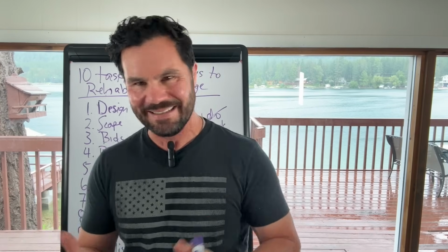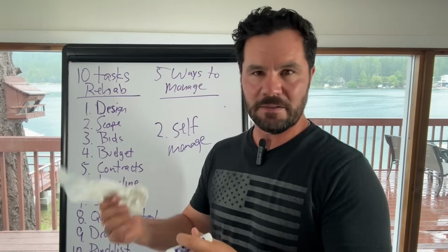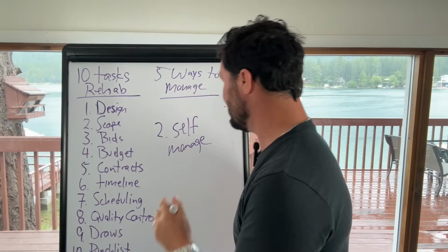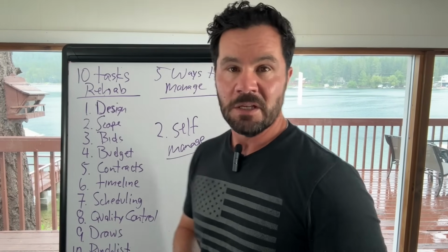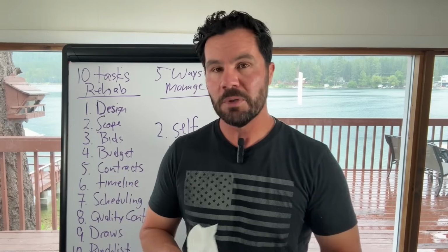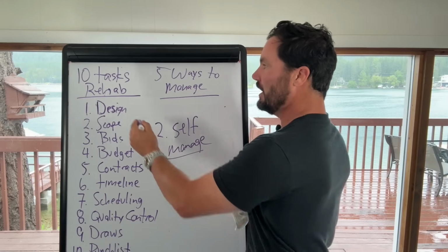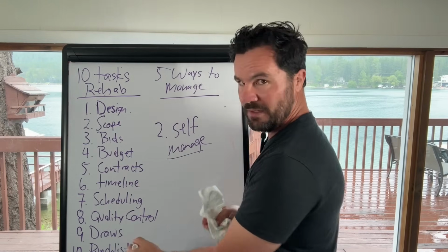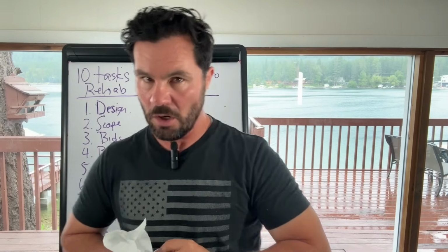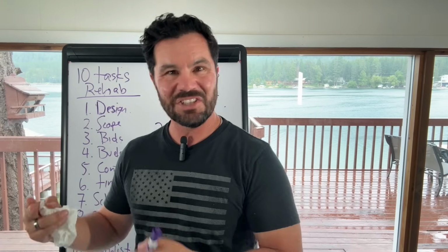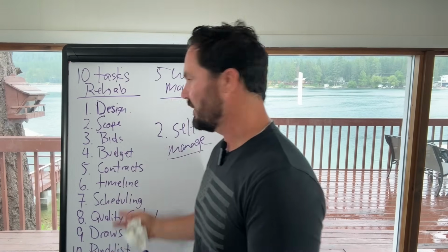Don't do that. Okay, the second least effective way to rehab houses is to self-manage. So you're not doing the work yourself, but you're managing all of the subcontractors. And self-manage means you do every single one of these tasks. You're the one that does all of it. Now, if that's you, get ready for a full-time job managing. You are not building a business and you are not able to scale very much at all because it just takes so much time to do all of these different tasks.